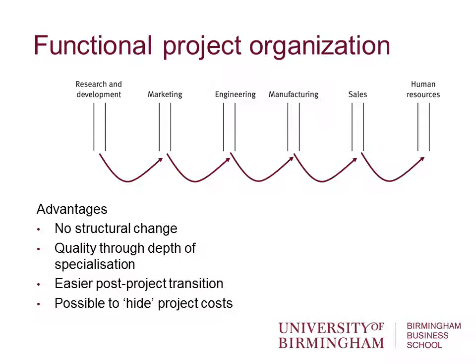You have quality through depth of specialisation. You can draw upon the resource of your particular function and apply that to the project if needed. You have easier post-project transition. So because the project's happening within the organisation, then the organisation can absorb the outputs of the project into the organisation generally reasonably easily. This last point is a bit of an ambiguous one, really, a dubious one.